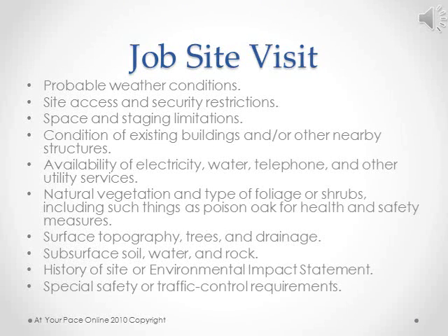Before preparing the estimate, the contractor must become familiar with job site conditions. Environmental conditions will invariably affect project costs. The following types of information should be determined from the site visit: probable weather conditions, site access and security restrictions, space and staging limitations, conditions of existing buildings and or other nearby structures, availability of electricity, water, telephone, and other